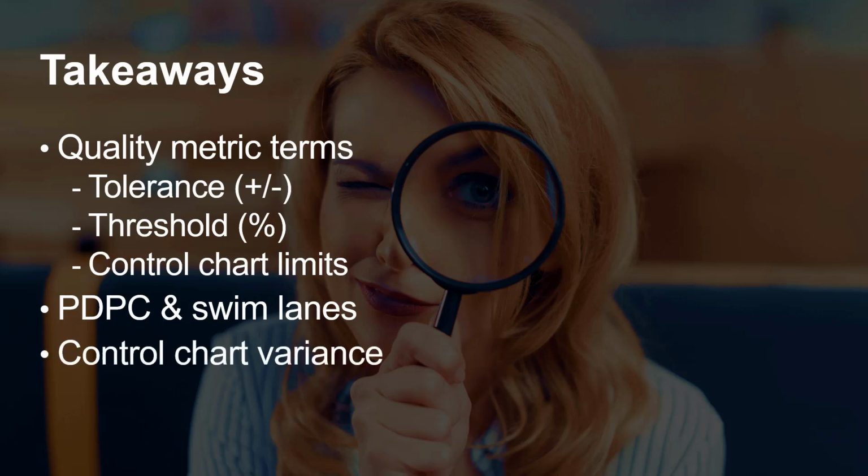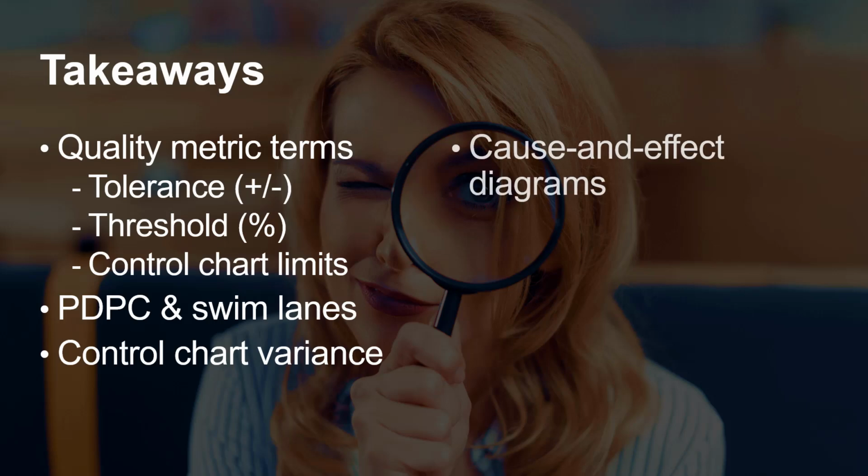On control charts, we measure variance and look for patterns in the sample measurements that skew performance and should trigger an investigation, including a special cause outside the control limits, the rule of 7 in a row on one side of the mean, or any run of 7 in a row trending either up or trending down. Using the cause and effect diagram, also called the fishbone or Ishikawa diagram, we start with a problem statement on the right and work backward to identify potential causes along relevant categories.